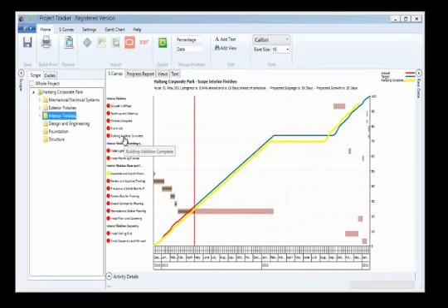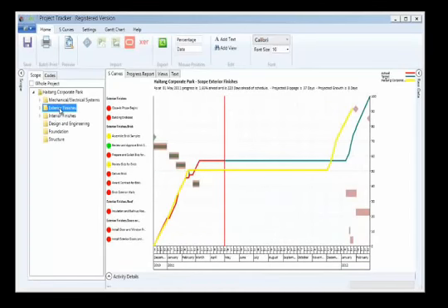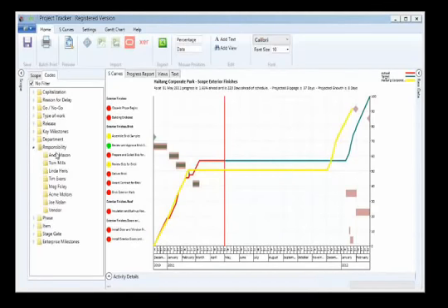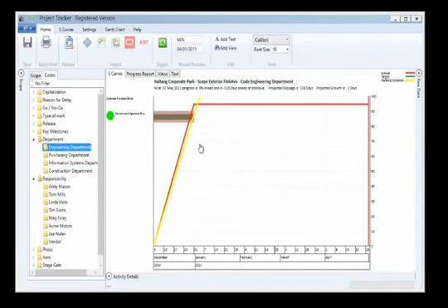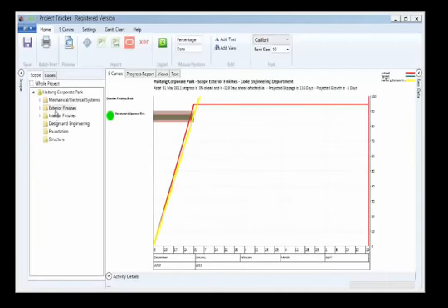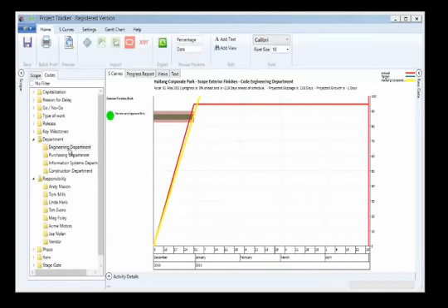So we're able to, once that data is imported, drill down and create S-curves for each discipline if required, and similarly for codes we might want to look at responsibilities or departments. So this is based on the exterior finishes work done by the engineering department, and there is only one activity, but on bigger projects it does enable us to perhaps analyze subcontractor performance more accurately.